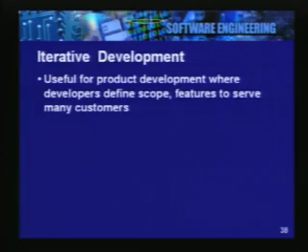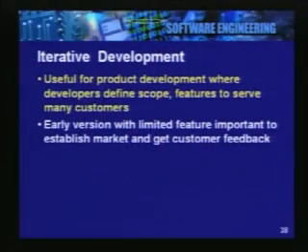Here, iterative development is a good methodology for those software projects which want to build products which will be of use to many customers. So, here we are developing a product whose functionality may not be clearly known, or there may be too many features that we may want to provide, but we would rather release a product quickly, capture the market, and get customer feedback. So, this is the situation which is ideal for iterative development.